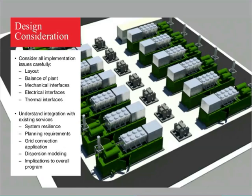Then, when you're connecting to the electricity grid, certainly in the UK, a grid connection application needs to be made, which enables the network provider to ascertain fault level currents, and to ascertain whether their existing infrastructure may require upgrading or is suitable for connection of the generation plant.